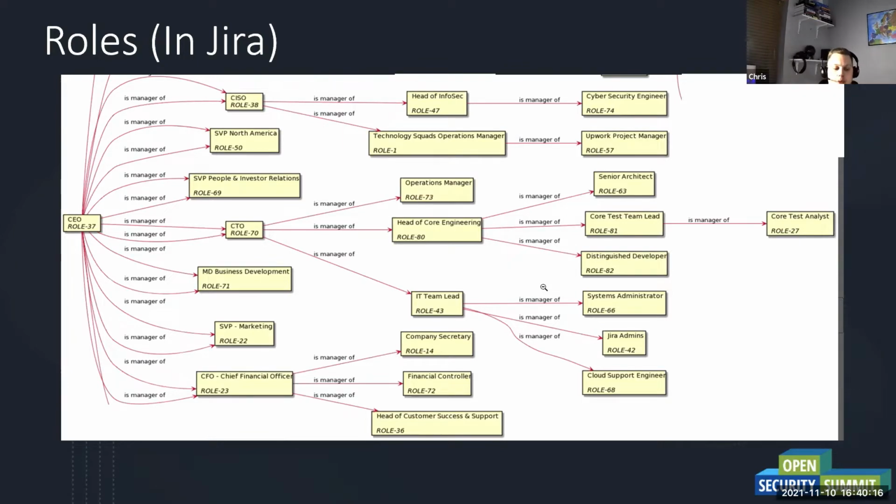and we've mapped out all the roles that are underneath him. What that's allowed us to do is to map each risk to a particular owner. So we'd have a business owner, a technical owner, and a stakeholder in some cases. But what that does is it allows people to be accountable for those risks. Without that, they get lost in limbo, and no one's really doing anything about them because they're not aware that they're the owner.